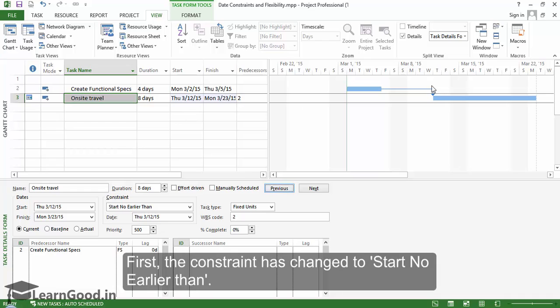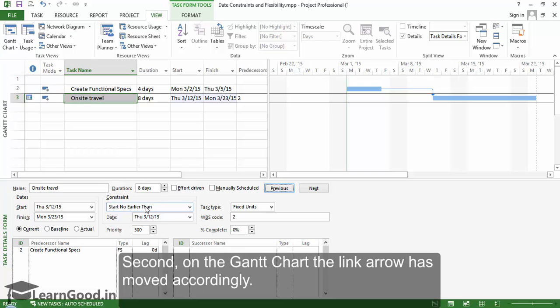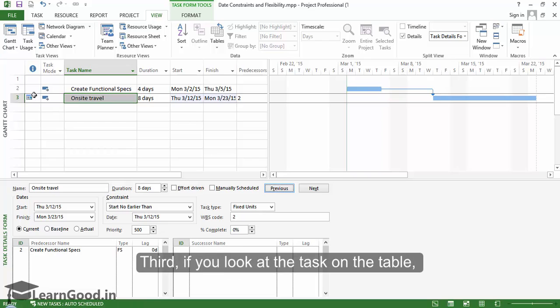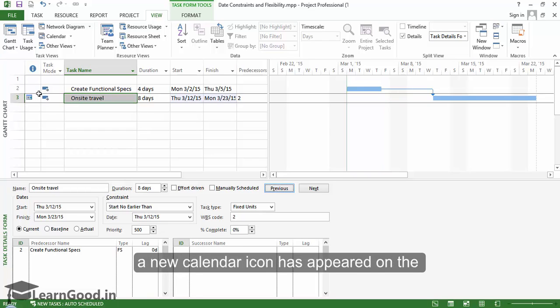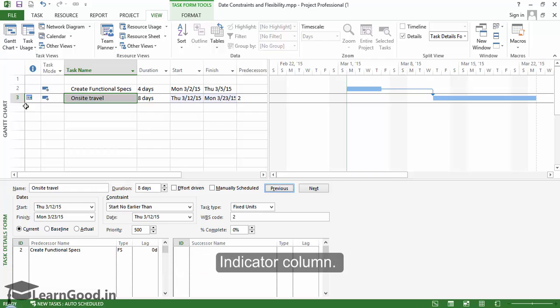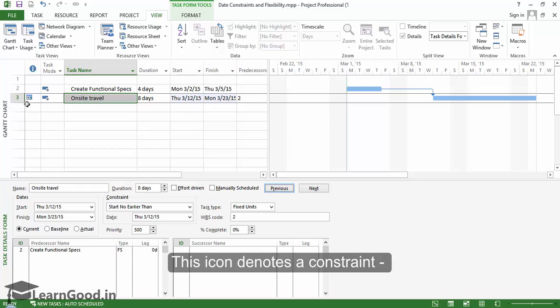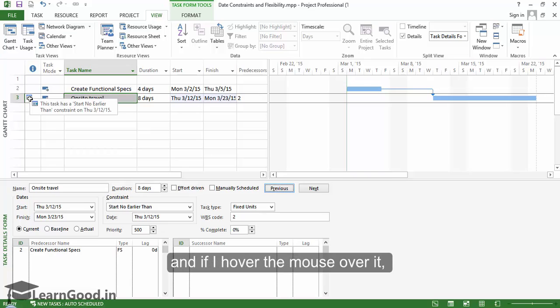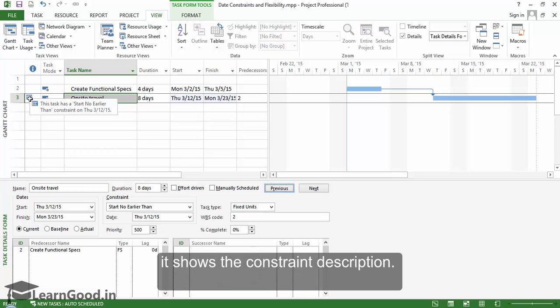First, the constraint has changed to start no earlier than. Second, on the Gantt chart, the link arrow has moved accordingly. Third, if you look at the task on the table, a new calendar icon has appeared on the indicator column. This icon denotes a constraint. And if I hover the mouse over it, it shows the constraint description.